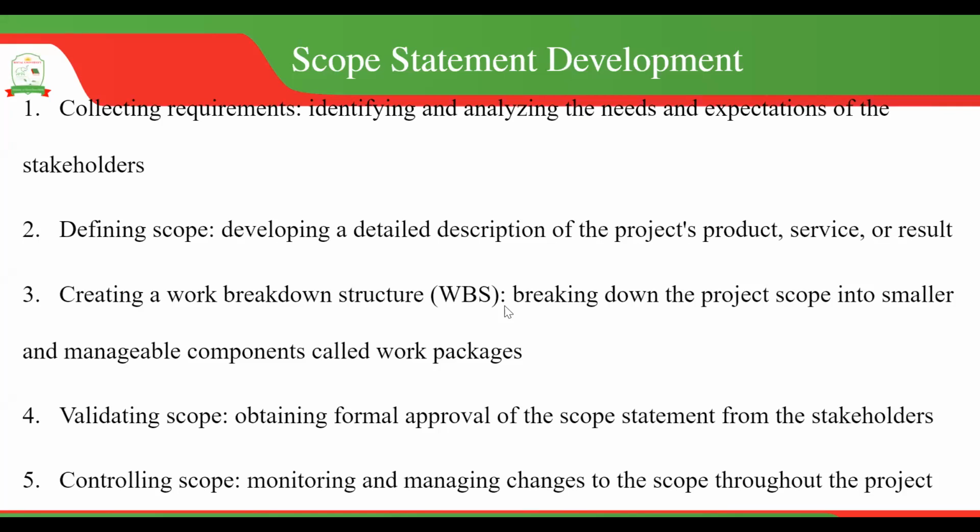You can use the work breakdown structure, where you break down the project into smaller parts that indicate what has to be delivered at any particular time, so that all of you are on the same page. This is very important because along the way, resources may have to be adjusted, and someone will say, I didn't know that we needed to do this.